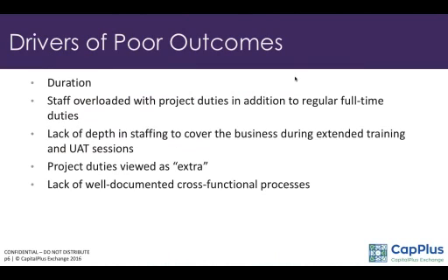They want it in a very short period of time. What everybody needs to understand is that these cannot be professionally implemented within a short period of time. A new system implementation will take at least 6 to 12 months to procure, and another 6 to 18 months to implement, depending on the factors or the modules that they choose.